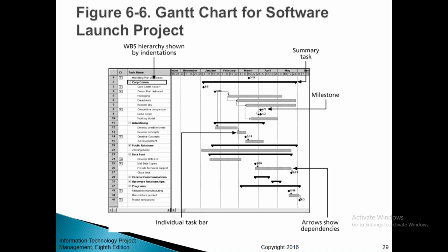Microsoft Project allows you to filter information displayed on a Gantt chart so you can easily show specific tasks such as milestones. The thick black bars with rectangles at the beginning and end represent summary tasks. For example, the activities listed in rows 2 to 5 are all subtasks of the summary task called scope, task 1.